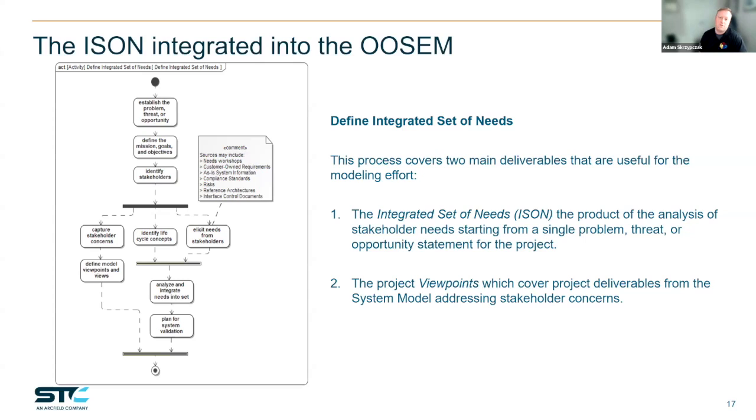The other domain we talk about when we discuss risk is also those dependencies. One key headache, I would say, for defense acquisition as of late was the idea of concurrent development. A lot of times we had systems where you'd be depending on a lot of technology maturity happening at the same time, and that imposes risks as well. So if you're depending on a system being in concurrent development with yours, that's also a risk you need to track, and you may have those alternatives and those needs identified.